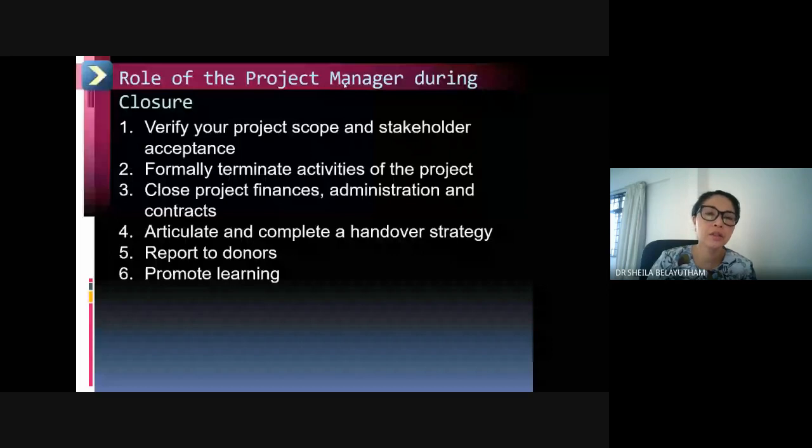So to manage just a few, you don't need to have so many engineers on the site. So you would have actually transferred them to another project. So maybe if you're left with an engineer, maybe just one, just to make sure that things are closing up. And sometimes you can see that closing towards the end is very slow.